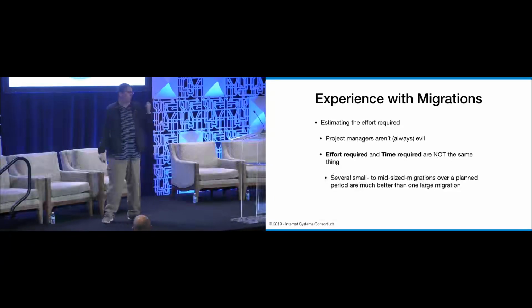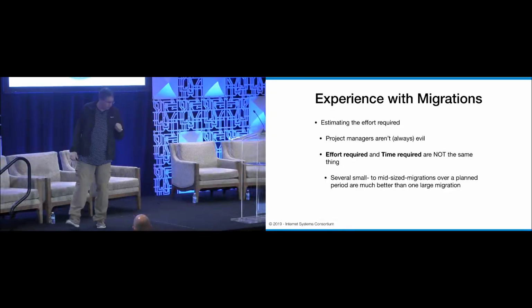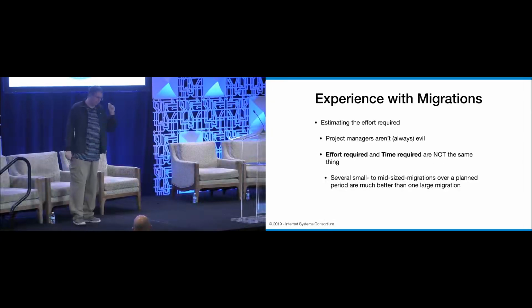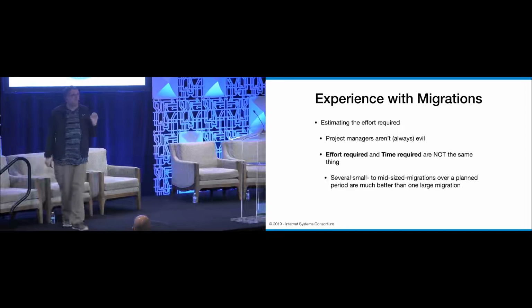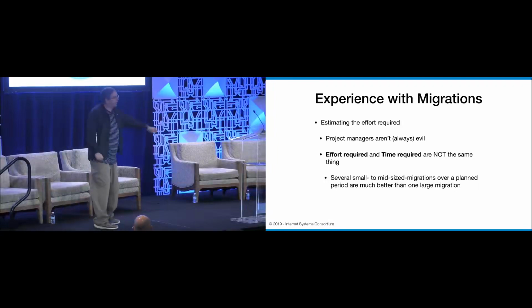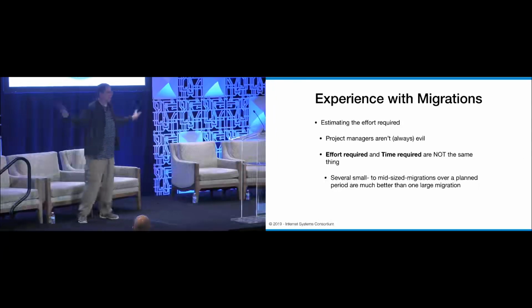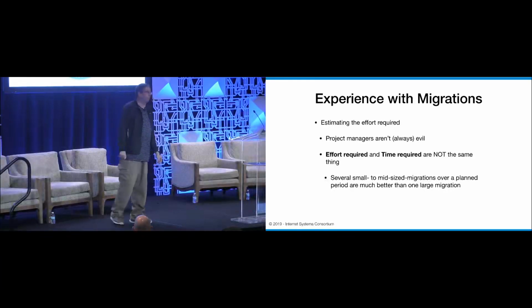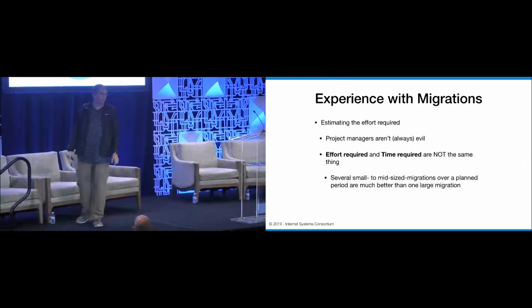And I will tell you from personal experience, several small to mid-sized migrations over a planned period are much, much better than one large migration. You go in and you say, well, when you guys come in on Monday, DHCP is all going to be new, it's all going to be great, and so you decide to make the big change across a huge organization overnight. You're setting yourself up for some real pain and suffering.